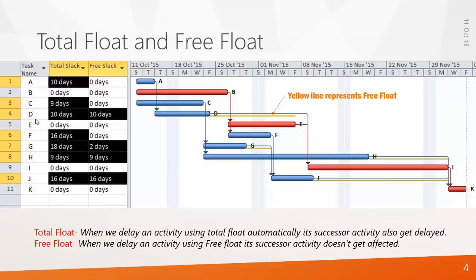Now look at activity D where free float is 10 days. If you delay activity D it won't affect its successor till a certain time. Similarly, look at activity G — you can delay activity G for 2 days without affecting its successor J. So that's free float: when you use free float, its successor activity does not get affected.